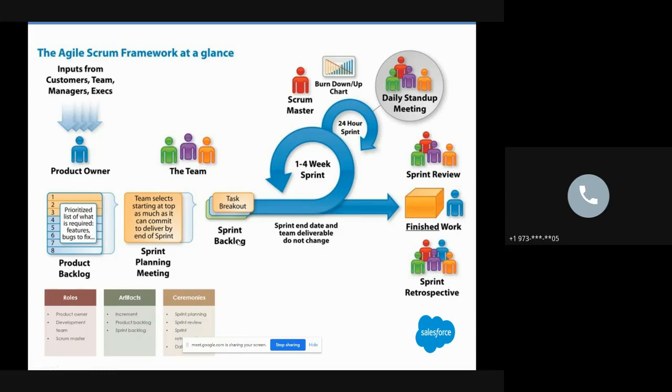And then the sprint cycle starts, right? So usually what I've seen is a 2 week sprint cycle. After 2 weeks, they have to deliver what they promised, right? Obviously, we are flexible. Nothing is rock solid. Sometimes we do well, and sometimes we might lag behind, right? But all those things can be tracked. So after the sprint backlog, the sprint starts. This can be a 1 to 4 week sprint, but a 2 week sprint cycle starts like this.